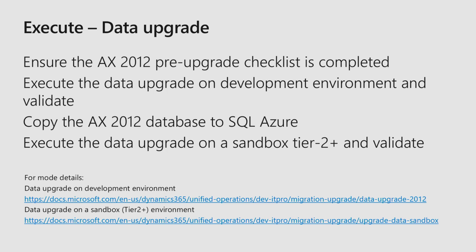The next step is the data upgrade. Once you have gone through the pre-upgrade checklist, you would copy your database to the cloud environment of D365, and you would go through the runbook to do a data upgrade. And then you would move to the validate phase.